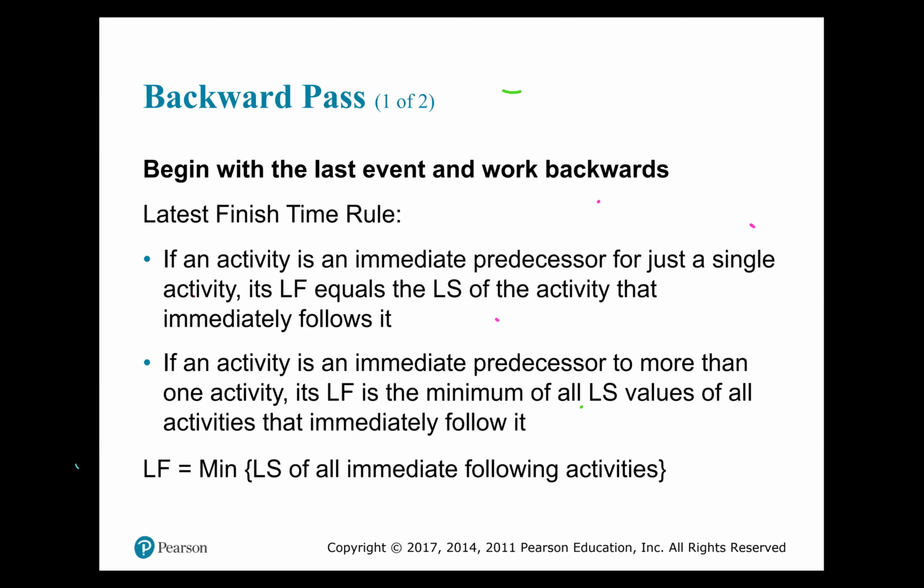If it is only one arrow that came into the finish node, you take the information from the finish node and walk back on that one arrow, and you place the information into that late finish slot.